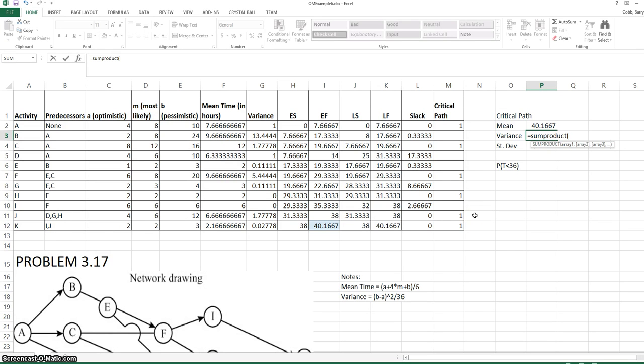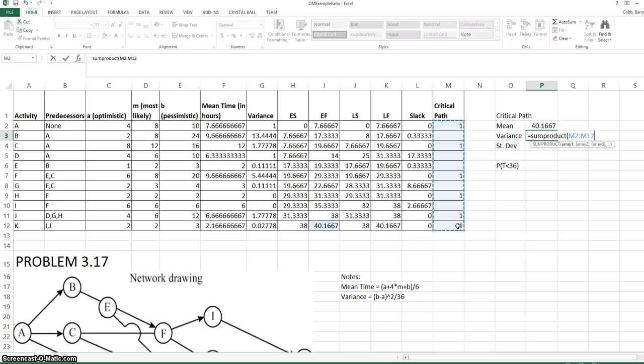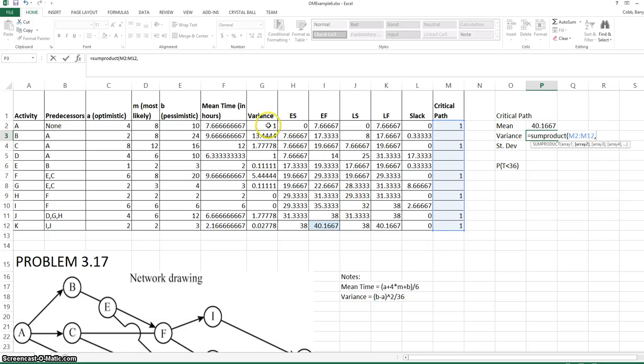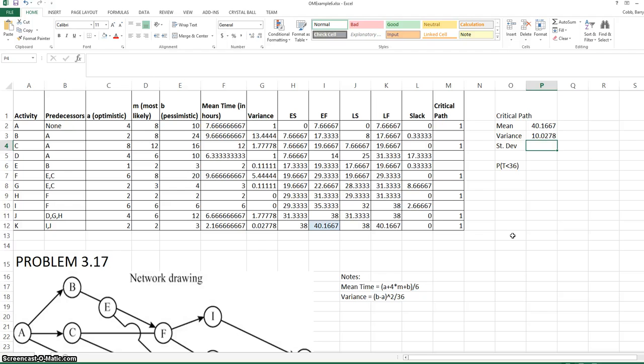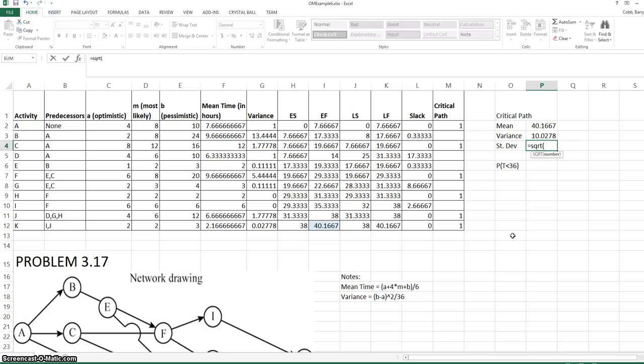The same formula works for the variance. We sum up the variances of the activities on the critical path. And a good way to do this is with the SUMPRODUCT formula, where column M contains ones and zeros. So 10.03 is the variance of the critical path. The standard deviation is the square root of the variance.